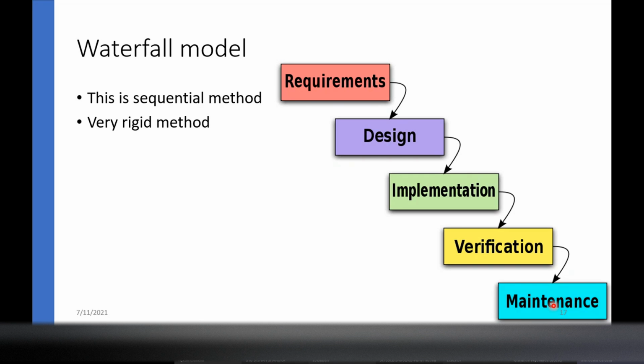Our requirements must be very clear. Because if an issue is found in any phase after design, especially implementation and verification, that means high cost, because we have to go back to the requirements and come again to verification.